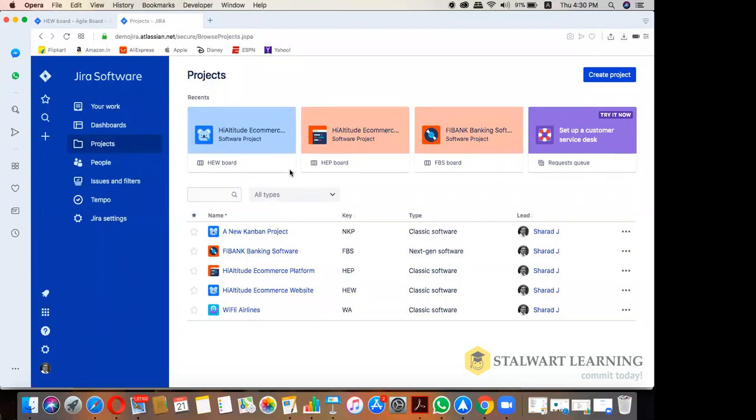All right. Yes, there are two ways to do this. One, you can create a filter which would filter out all the completed stories. You can create your own filter and save it, and once you save that filter, you can use the issue analysis report and put that in your dashboard. So you can always see in your dashboard what the completed stories are.